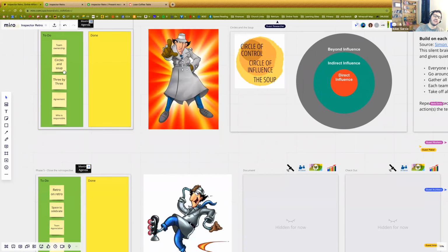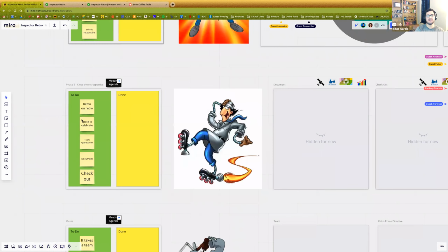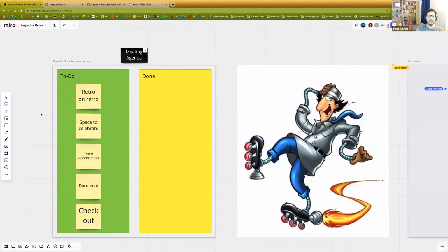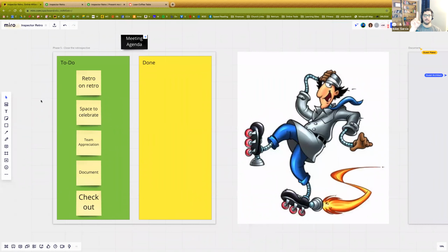Oh, it's okay, so-and-so and so-and-so will do it. Nope. Oh, it's okay, the team will do it. Nope. Oh, it's okay, we'll remember sometime during the sprint. Nope. You make sure each action item, one name.